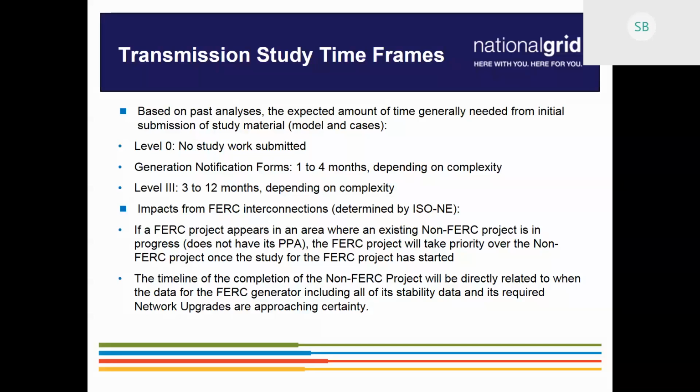As far as transmission studies, the process is a little bit longer because we need more modeling requirements, right? We need to model the specific projects. We need to make sure that we have the right cases from ISO New England, the right projects in the area, and then once we have approval on the scope of the study from ISO New England, then we perform the analysis. The analysis is more involved. It's a lot more scenarios that we need to look at.